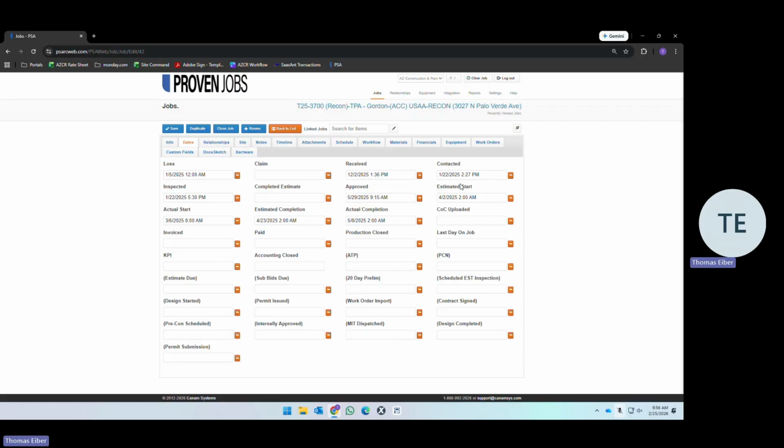So adding a date here for a job that is linked to Exactware or to Symbility will put that date in the job's assignment in that portal. So if I put an approved date, it pushes to the appropriate portal. If the date is entered from the portal, it pushes to here as well. So it is a two-way sync for the items not surrounded by parentheses. Entering dates into there affects the jobs in the portals and adds real dates to them.